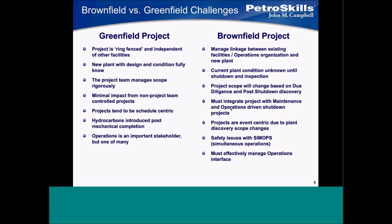So you look on the right-hand side — brownfield project: manage the linkage between existing facilities, the ops organization, and what you're going to build. The challenge you have is working with operations and maintenance, because they drive the work schedule.